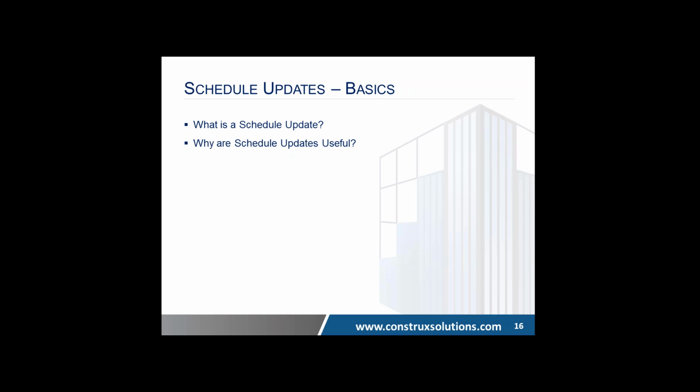The fact is, we can update the schedule, and all these relationships will continue to recalculate the start and finish dates based on the progress achieved over time. For example, if I've updated my schedule after a week or two or even a month, I've said which activities have started, which have finished, which are in process. The program's going to take all that into account, and then it's going to take the same logic and the remaining durations calculated on the activities that are still in flux, and it's going to recalculate your plan.